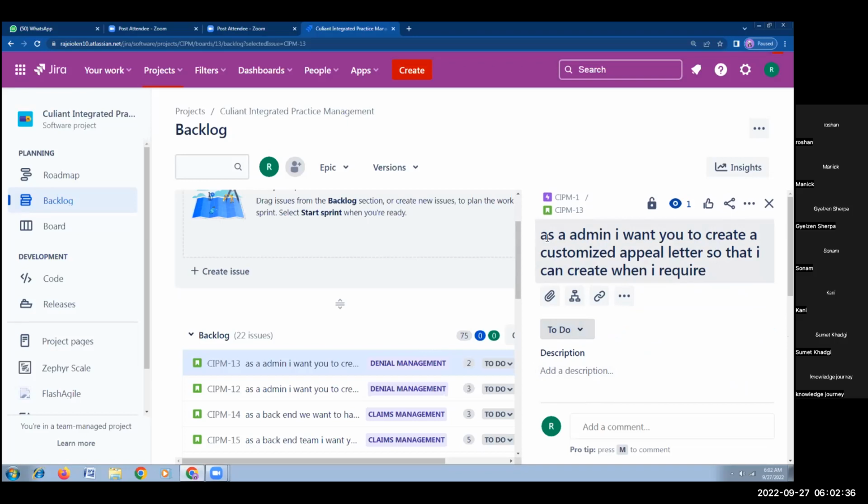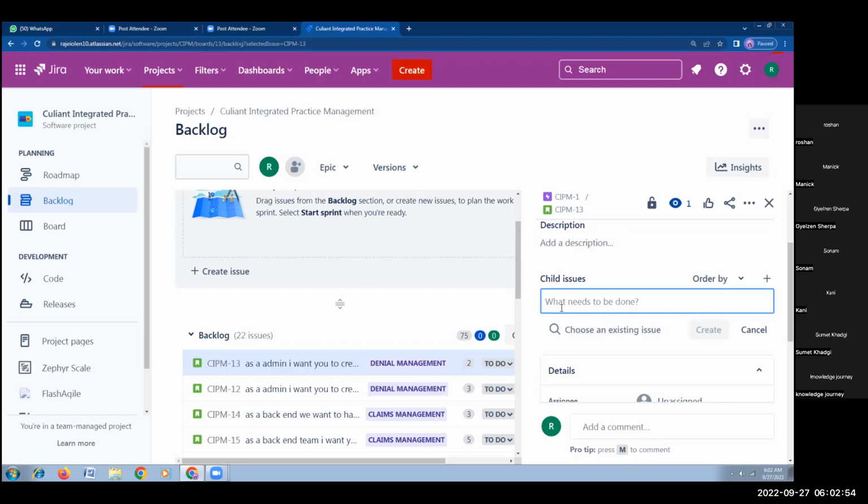Now, let's say user interface designing is one task, database designing is another. At the same time, testing is performed by others, and coding will be done by others. So how many tasks have we got? We have got 4 tasks now. If you want to divide this issue into tasks, we have an option where we can divide into tasks here. You can prepare as many tasks as we want. This task creation will be done by the team, who will decide based upon the complexity they have.